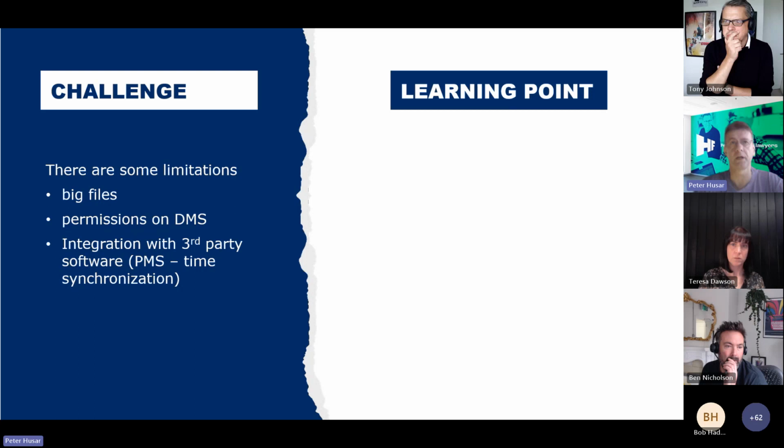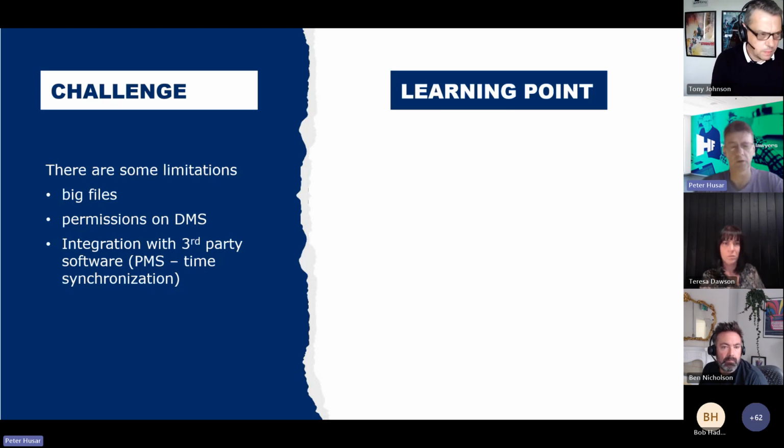I'd just like to give one example, and this wasn't a problem on the Shardo side actually, but with our finance system. When we were checking what's possible and what the API can do, we said, oh yeah, it can do this, perfect, everything is fine. So we actually planned at the beginning to have two-way synchronization between our finance system and our case management system, Shardo, so people would enter time in Shardo and it would be in the finance system, and vice versa. In the end, when we started to do it, we found out that it would not work as we wanted, and we just had to change our plans.